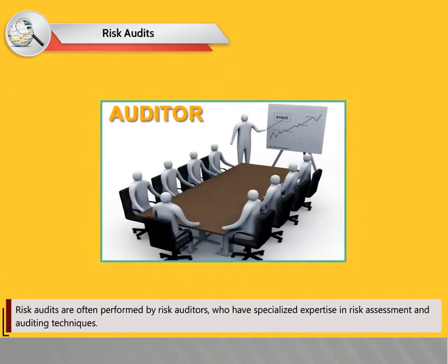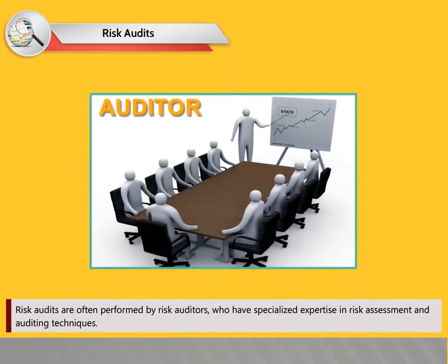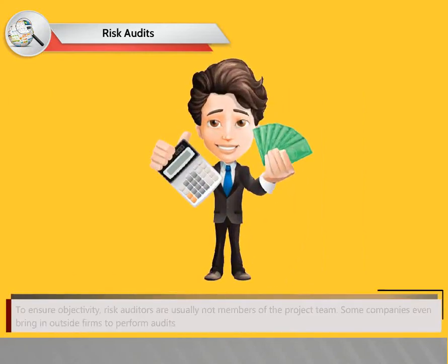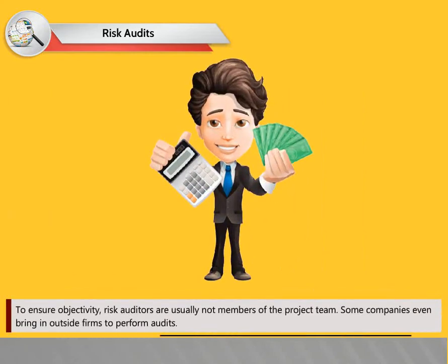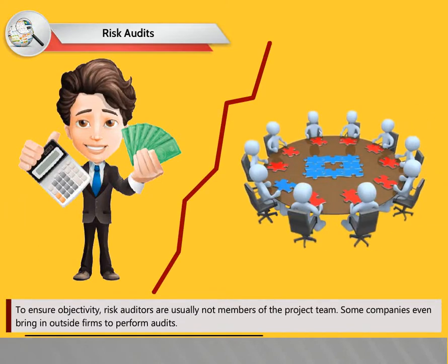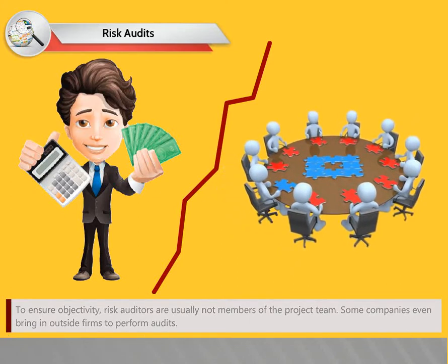Risk audits are often performed by risk auditors who have specialized expertise in risk assessment and auditing techniques. To ensure objectivity, risk auditors are usually not members of the project team. Some companies even bring in outside firms to perform audits.